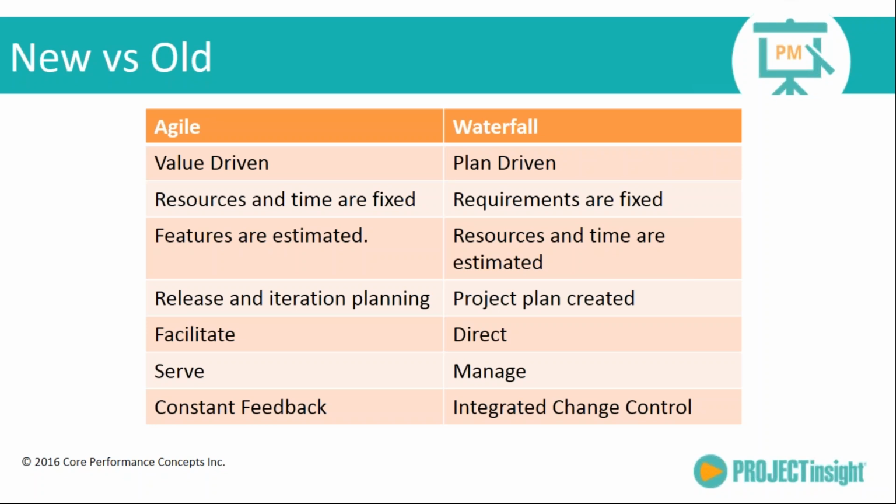If I've got dedicated people to work on this project, great. I would lean more towards the waterfall, like I said earlier, if the requirements are fixed. If your client really doesn't necessarily know what features will solve their problem, probably lean towards more of an Agile